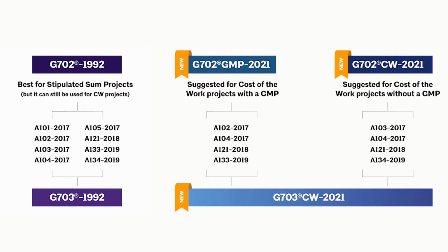The forms are designed to, as Roger said very clearly, allow the contractor to clearly identify the line items as they move around. In each of those situations, whether it's with the G702 GMP or the G702 CW, the G703 that works with both of those serves exactly the same function. The main difference in all this, as we'll show with the visual documents later on, is that we worked hard to be clear on what was the original cost and to work through what the changes are from previous applications. So as Roger described it, you can track it. And that's the main thing that these do. So to answer your question, Mike, at the end of the day, the continuation form is the same because we're tracking in the same way for both of those. The cover sheet has those differences, which we'll be talking about.